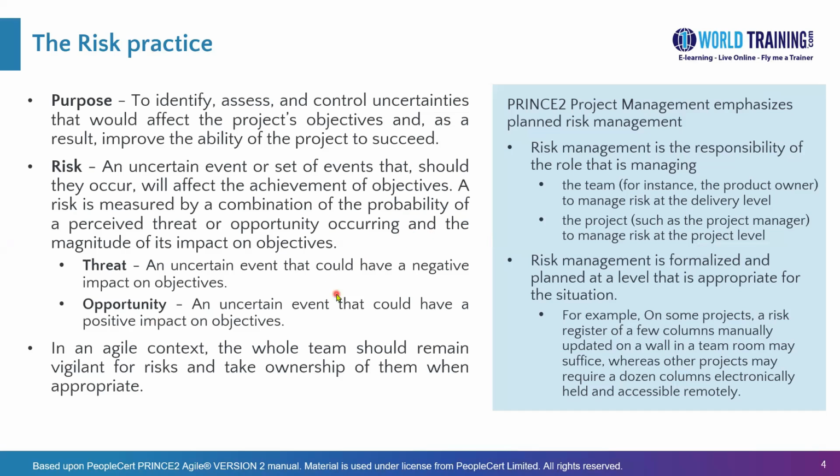And we are not saying that everybody should own a specific risk, but everybody should participate in risk management, irrespective of whether there is a risk manager appointed or whether it's the project manager who is owning the risk management, which typically they will have to. Which means that risk management needs to be planned properly. And it can be a team risk or a project risk. So team risks are handled by the product owner at the delivery level, whereas the project risks are handled by the project manager, handled meaning managed.